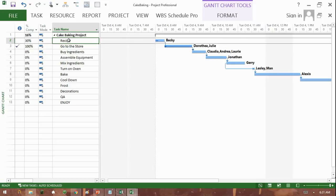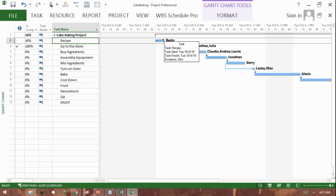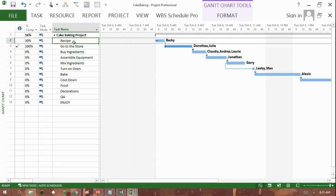So in this particular task, the recipe in this cake baking project, you can see that when recipe finishes, go to the store starts. We call that a finish to start relationship. The recipe task finishes, and then the go-to-the-store task starts.